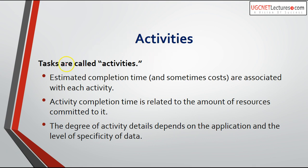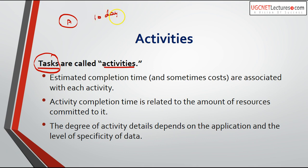Tasks required to complete a project are called activities. Each activity has an estimated completion time associated with it. The completion time is related to the amount of resources committed to that activity — fewer resources means more time, more resources means less time. For example, if activity A requires 10 days to complete with two people, increasing the number of people will decrease the completion time.